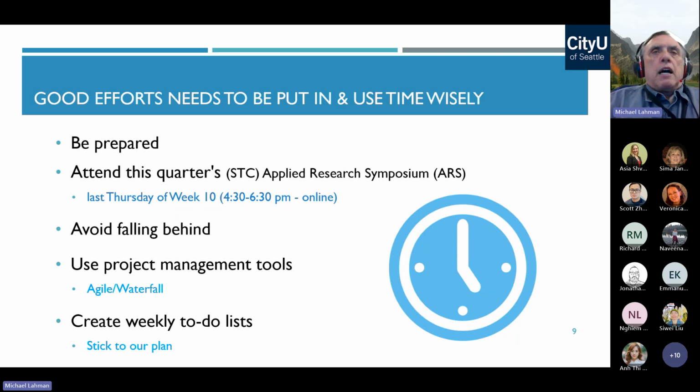And so sometimes the students are a little weak on trying to put things together, but through the weekly, what we call a scrum, there's a portion that's called a scrum within the shell itself. And what it is, there are 3 questions we're asking. Okay, what'd you do this week? What do you plan to do next week? And what are your issues? What are your problems you need to overcome?